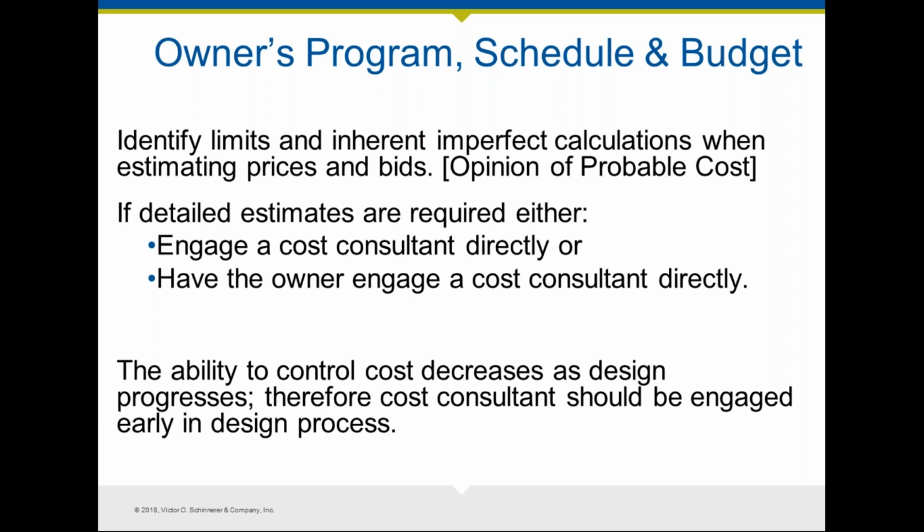Remember that obviously the ability to control cost decreases as your design progresses. So for all intents and purposes, really the most effective time to have a cost consultant is early in the design process before the requirements are baked in.